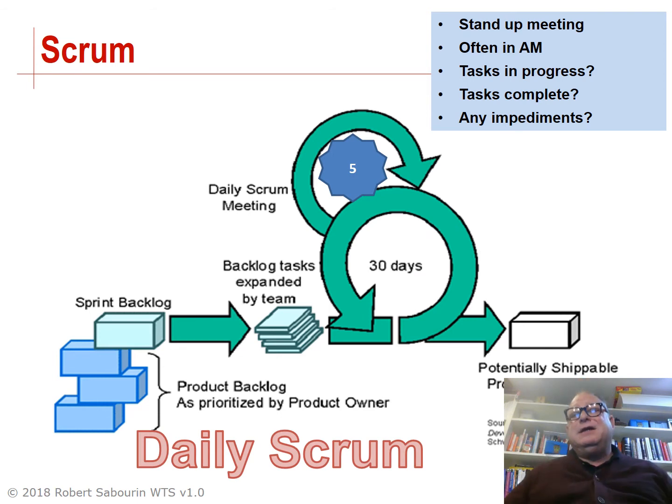Every day during the sprint, the team holds a meeting. It's a daily stand-up meeting. The metaphor for a stand-up meeting is that you stand up, it's short, and no one has a chance to get comfortable and sit down. The stand-up meeting is often at the very beginning of the day, in the morning, but it's up to the team to organize when it is. For distributed teams, you may have it almost any time on the clock.